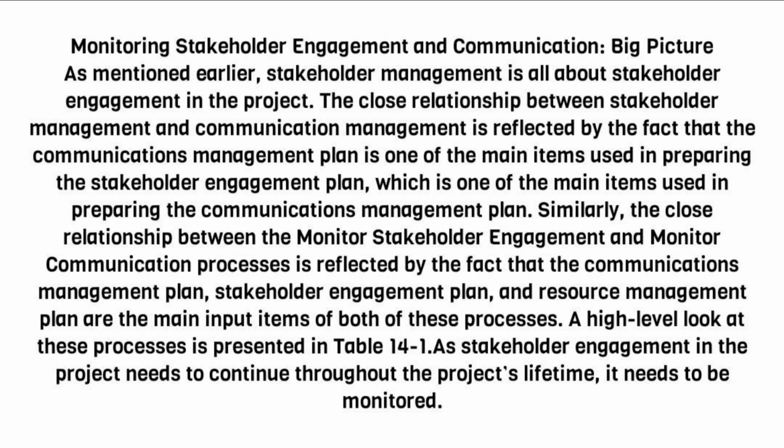Similarly, the close relationship between the monitor stakeholder engagement and monitor communication processes is reflected by the fact that the communications management plan, stakeholder engagement plan, and resource management plan are the main input items of both of these processes. A high-level look at these processes is presented in Table 14-1. Stakeholder engagement in the project needs to continue throughout the project's lifetime. It needs to be monitored.